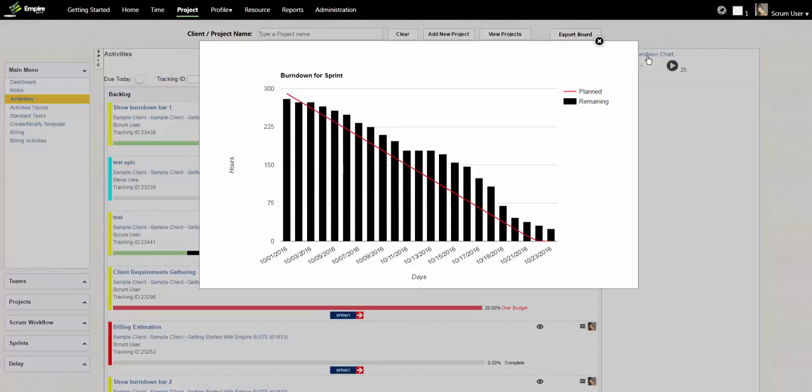Plan time is reflected in a line graph format. It is shown as the diagonal where the point on the left is at the highest value for the unit of time and the point on the right is at the lowest value for the unit of time. This means that the work plan has been decreasing over time because it's being worked on as the sprint progresses.